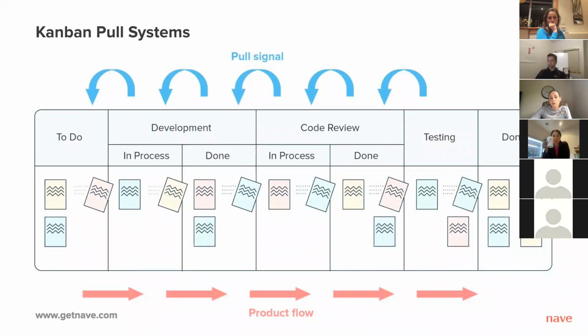The absolute minimum to successful Kanban implementation is establishing a Kanban pull system. Visualize your workflow and limit your work in progress. Instead of pushing tasks into the process, let teams pull work only when there is a demand for it and they have the capacity to handle that demand.